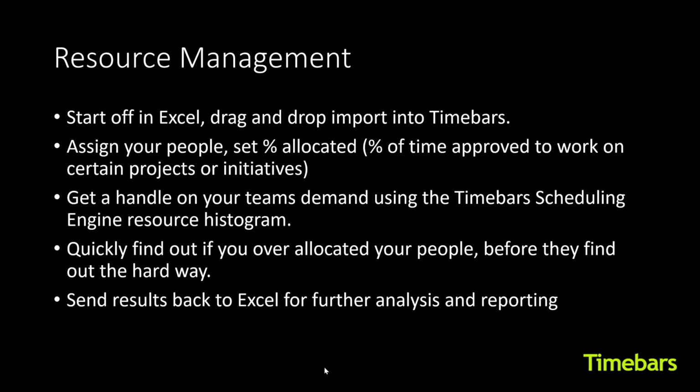So I'm not going to have any more demonstrations. I just want to discuss the resource management processes. So you start off in Excel with your current list that you have today. You drag and drop them into Timebars. Assign your people, set the percent allocated, percent of time approved to work on the projects. So you, as a resource manager, you will know that you're going to assign Joe to a certain project at 25% of his time.